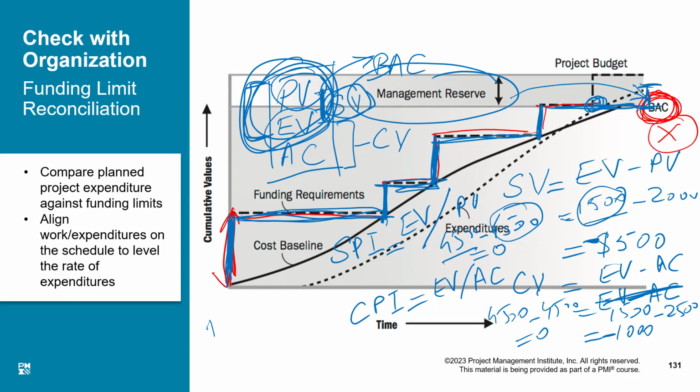Good. And if your value falls behind the value of 1, that is 0.9 or 0.8, that is bad, right? So let's do the same calculation. Here, I say the first month EV was 1500 divided by 2000. So naturally, my answer is 0 point something, which is bad. Say it is 0.75. So it is bad.